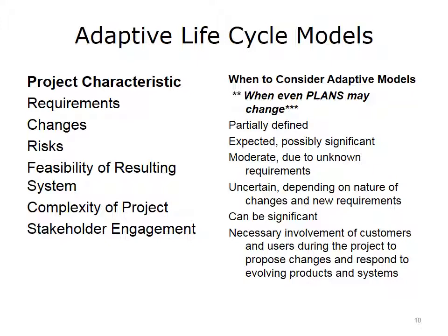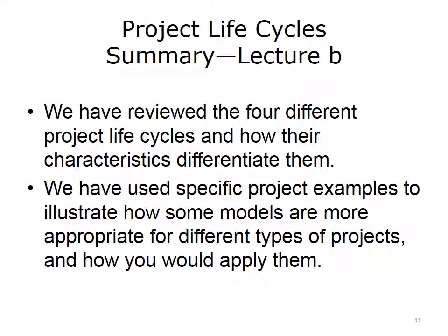Adaptive models are very useful for the times that you go live with a system. You can have your linear process to build and test the system, but you might want to build in an adaptive model for the immediate time after you go live. As issues are identified in the system, you can use that adaptive model to make changes and show them to your stakeholders so they can approve it, and this way those issues are turned around very quickly.